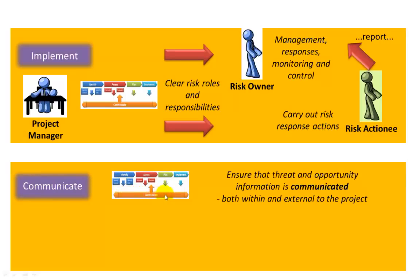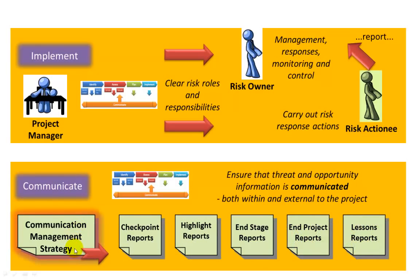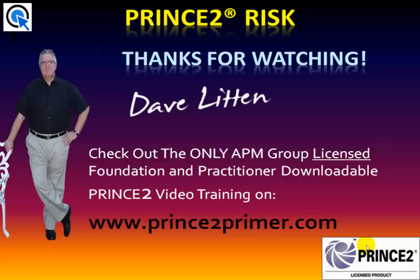The final step is communicate, which runs in parallel and is carried out continually to ensure that threat and opportunity information is communicated both within the project and externally. The main document created in the initiation stage is the communication management strategy, which dictates how communications — including risks — are to take place. Checkpoint reports will contain risk status, as will highlight reports. At the end of a stage, the end stage report describes the risk situation, as will the end project report and any follow-on actions. The lessons report will contain any risk management learnings to be passed on for future projects.